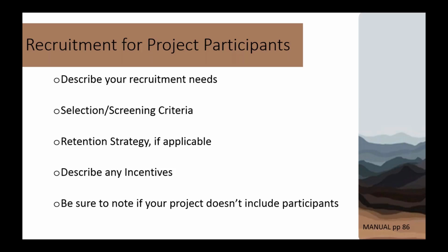These retention strategies might be small stipends. There might be some kind of incentives for their continued participation in the project. It might be services you provide for people. Maybe you're doing a workforce development project for single parents, and you might give vouchers for daycare services, or maybe gas cards so that they can keep gas in their car and keep going to participate in your trainings. Those are the types of things we want to know, how you're going to keep people involved in your project.